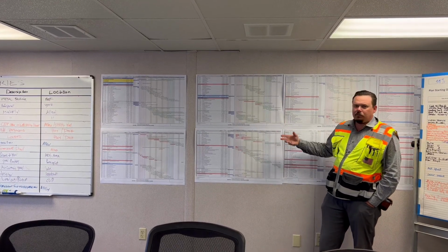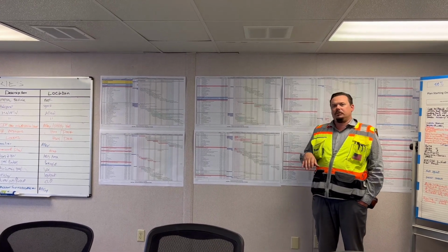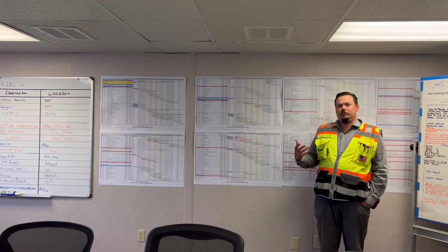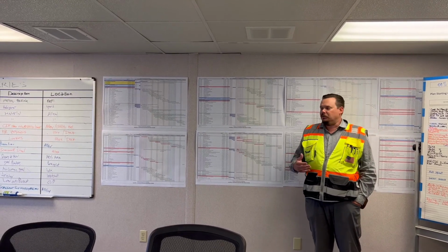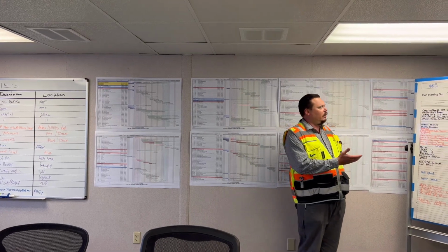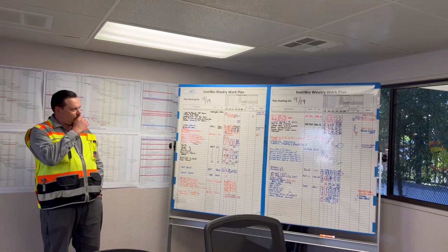As we go through these, we talk about the constraints, we note them down, and we pump them into our actual constraint log. We assign who is the requester and who is the responsible party, and put due dates on them, so that we can take the 6-week look ahead and our constraints and work through it in our make ready planning, or the weekly work plan, as a lot of people use this template.